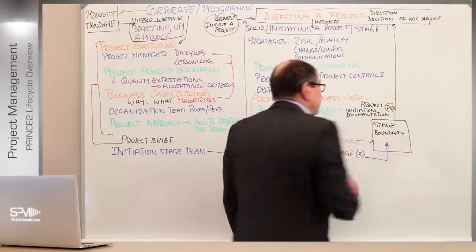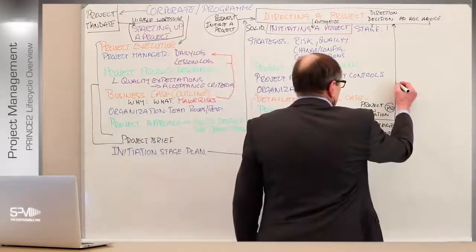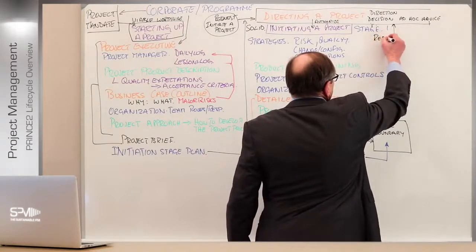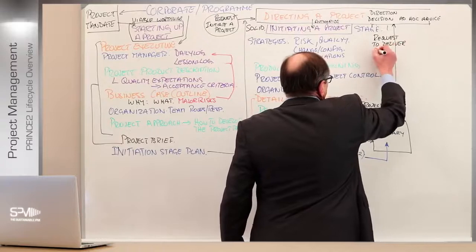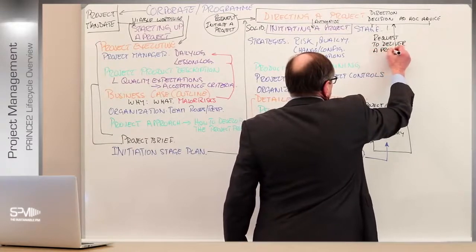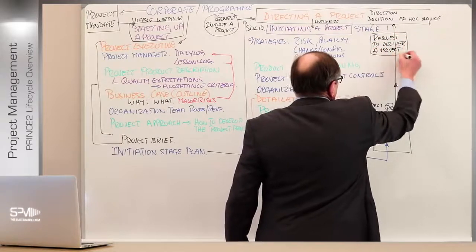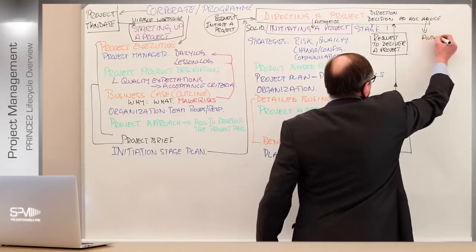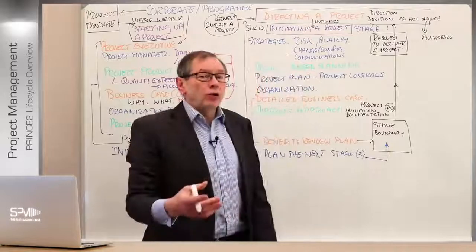Remember, please remember, the PID is not a document, it's a collection of documents. And therefore we take all those three to the board, and we request authority to go to the next stage, at which point they will then authorize the delivery of the project. They have to authorize the project.